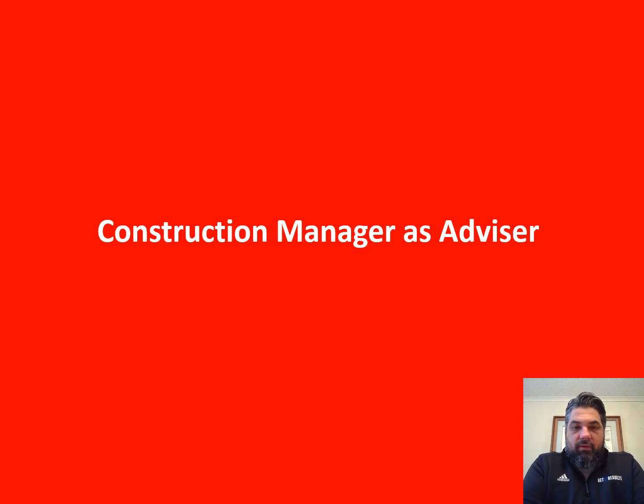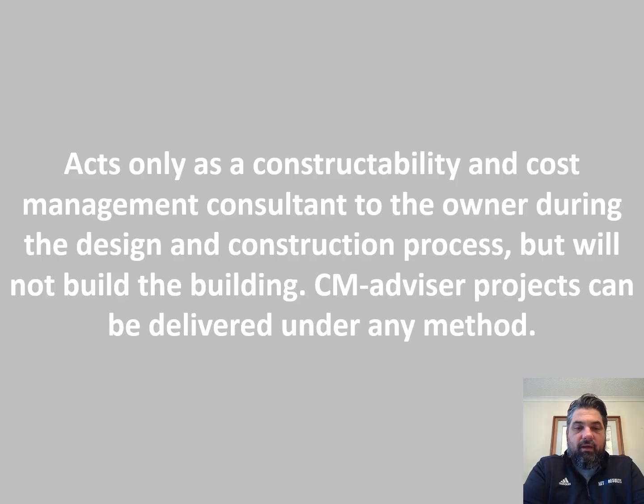The next three delivery methods are all construction management related delivery methods. And all of them have similarities and degrees in which the construction manager is involved and has responsibility toward the project. And so we're going to go through these in terms of least involved construction manager to most involved construction manager. So construction manager as advisor is where the construction manager acts only as a constructability and cost management consultant to the owner during the design and the construction process, but will not be building the building.